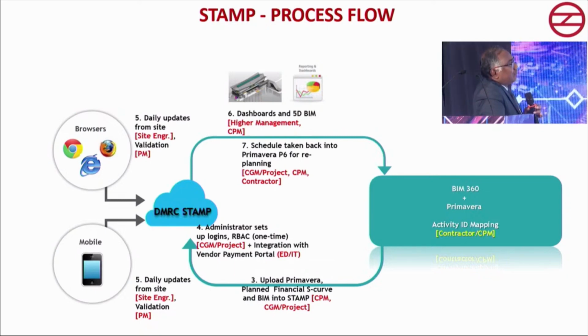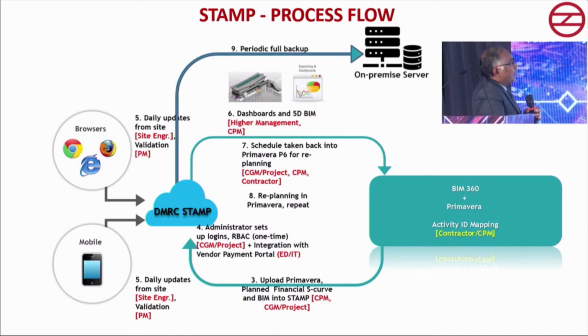Either you extend your time plan, or, because it is a linear project, whereas earlier you divided it into 3 sections, now you can put in more resources and divide it into 4 sections. You can replan it and push for timely execution. So rework can also be done. Then this is the backup. On the cloud there is already a facility for backup, but we have put an on-premise server also, so every day everything will get backed up on the server.